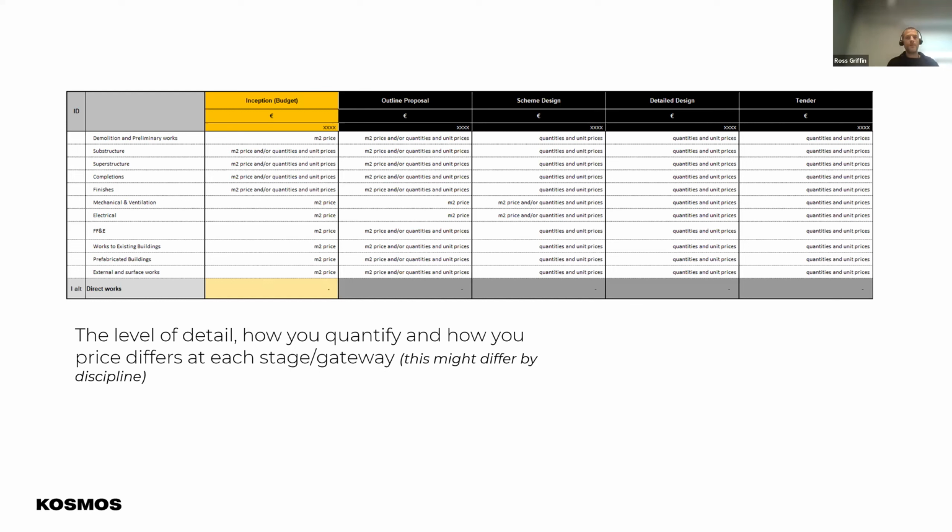But as soon as, what we believe at least anyway, as soon as you begin to develop design information, we start quantifying. Because we're using that information from 3D models, it means that we're already starting the process. It's a little different if you're doing from 2D and you need to re-quantify every time on 2D, a huge laborious task.